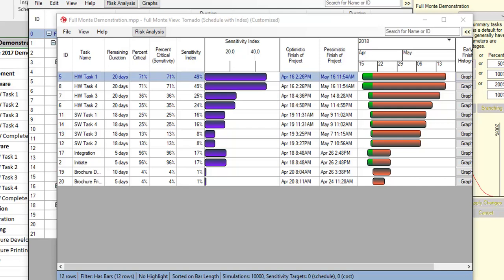The tornado chart serves three purposes. Firstly, it shows us the tasks creating uncertainty in the project delivery. Secondly, it shows which tasks tend to improve the average project completion when they finish towards their optimistic best case duration, the green component of the bars. And thirdly, it provides a sanity check that the major components we expect to drive the schedule are in fact included.